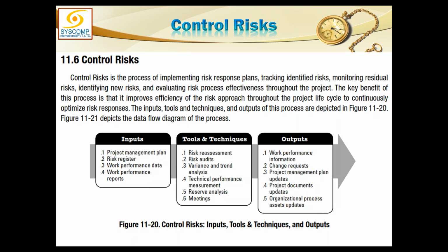When you initially planned and identified those risks, you could have imagined and thought of a number of risks, but not all. So when we are in monitoring and control, we keep doing the whole process of risk identification, risk analysis, qualitative and quantitative, and creating the risk response. So we'll keep doing all that in the control risk process.